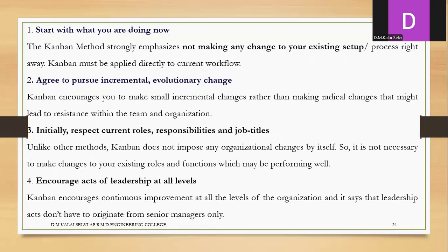First principle, start with what you are doing now. So you won't make any changes to the existing steps. Whatever requirements you are getting at that stage, you will be doing the work. Second one, as it comes under agile methodologies, the Kanban system encourages any changes in an incremental manner.